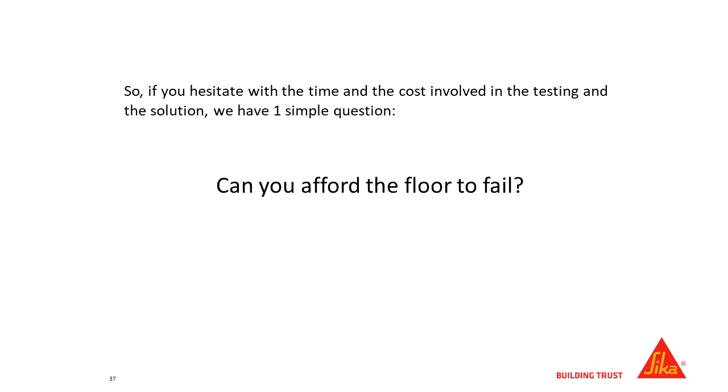And that's the key. And that's something that I've had to sit in front of general contractors, architects, and users and explain, because we understand that moisture mitigation is not an inexpensive change order, and you get a lot of pushback on it in the field from the people that you're dealing with. But the question I always say is, is it cheaper to pay this addendum or this change order, or is it cheaper to reinstall this floor 3 months from now when you have all the furniture on top of it?